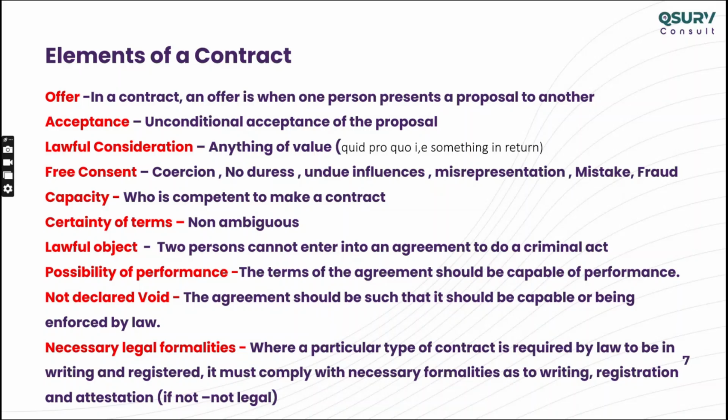So acceptance should be unconditional. One of the key aspects. So when you receive a tender return, where the contractor submits a tender for 10 million, you have to make sure that it is unconditional. There is no qualification, no exclusion. Because if such things are there, that is impacting the validity of the contract. In legal terms, they call it an absolute and unqualified offer.